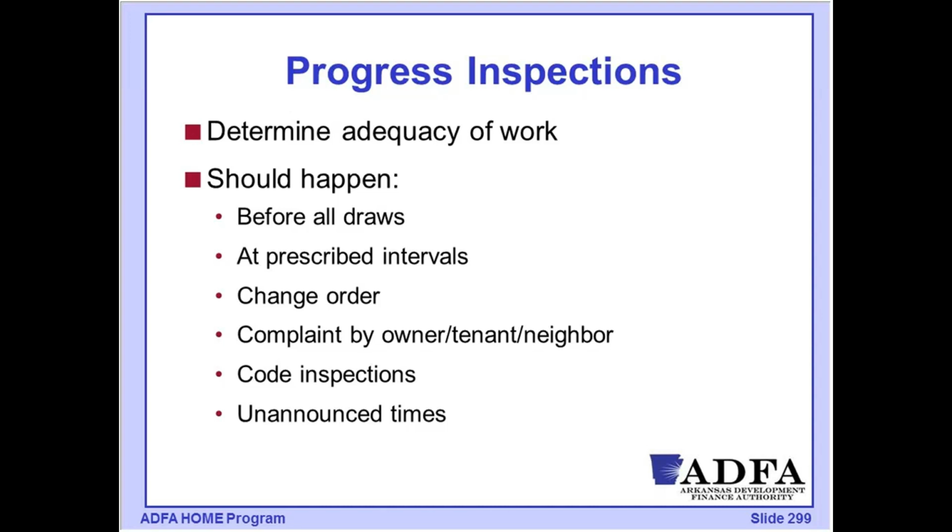There would be code inspections. Depending on the scope of work, we'll determine what inspections will need to be done. And then nothing better than unannounced, to simply stop by and see, is anything happening on that site? I can't tell you the number of times I've accompanied a construction manager who took me to a site to show me a project that was underway, only to discover that there was not a soul on that site.